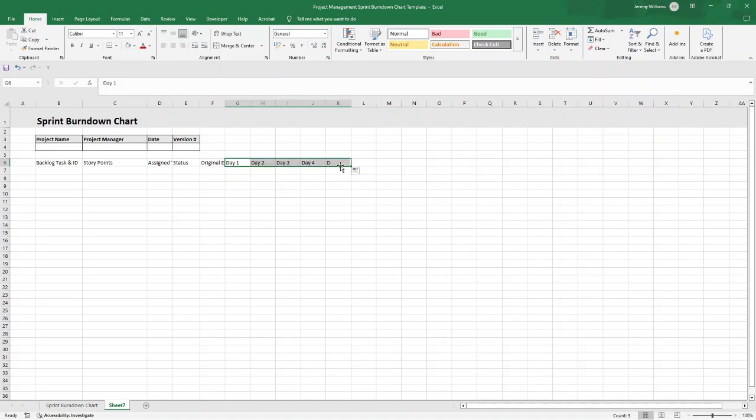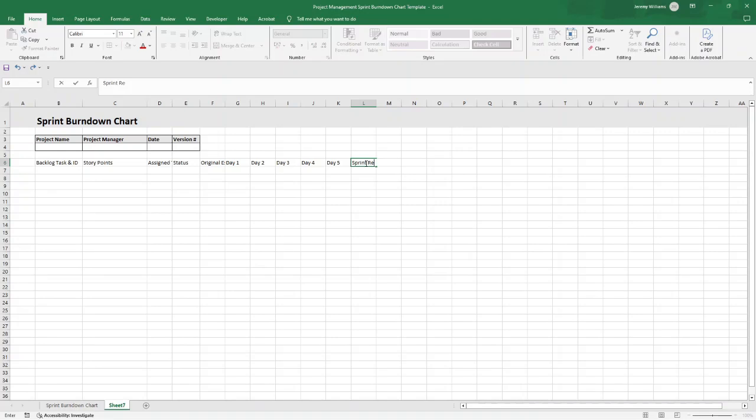Then we're going to want the number of days that we expect the sprints to run for. So I'm going to do five for this. I'll just put Day 1 in G6 through to Day 5 in K6, and then at the end we're going to put the Sprint Review. This enables us to show the final status of remaining work at the end of the sprint.